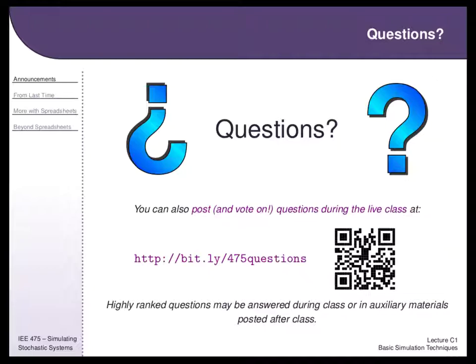And we'll talk a little bit about lab 3 today, and then have a few questions. On the second part of the lab, for the average of the total duration, is that just the average of the critical path, or are we talking about all three? The question was, on the second part of the lab, I asked you for the average of the total duration. The total duration is the critical path, so I'm basically looking for the average critical path. I'm looking for one number at the very top, or also reported in your Word doc, that is just the average of the max times, where each row has a max time, and you're averaging across those. On to that, the bonus question is just a histogram of the critical path times.